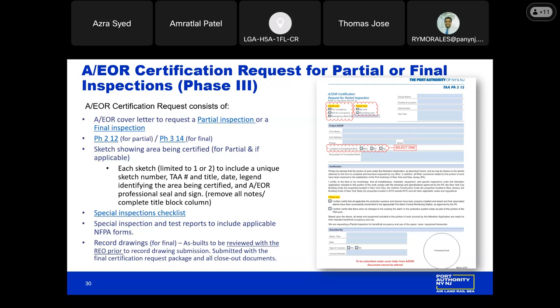When it comes to elevators, escalators, and moving walks, we recommend PH212 not for occupancy for all routine inspections, whether they're inside shaft, pit, or overall elevator inspections. And of course, the goal is to get the occupancy checkbox to match in accordance with your phase construction on your approved drawings. So just be cognizant of that, please.